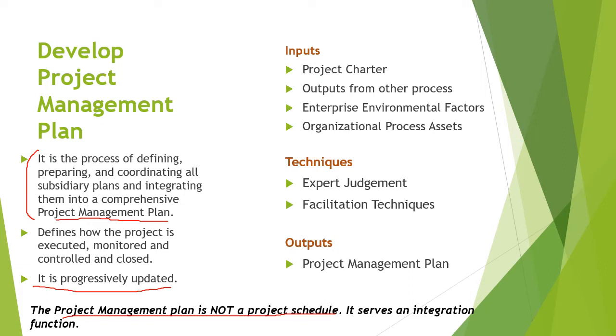The project schedule only takes care of what all the activities will be there and how the activities will be scheduled on a time to time basis, right? So basically, the project management plan is not a project schedule. Schedule is only about the project activities. The project management plan is much more than a project schedule. The project management plan serves an integration function. Now let's look at the inputs, tools, techniques, and outputs of the develop project management plan phase.